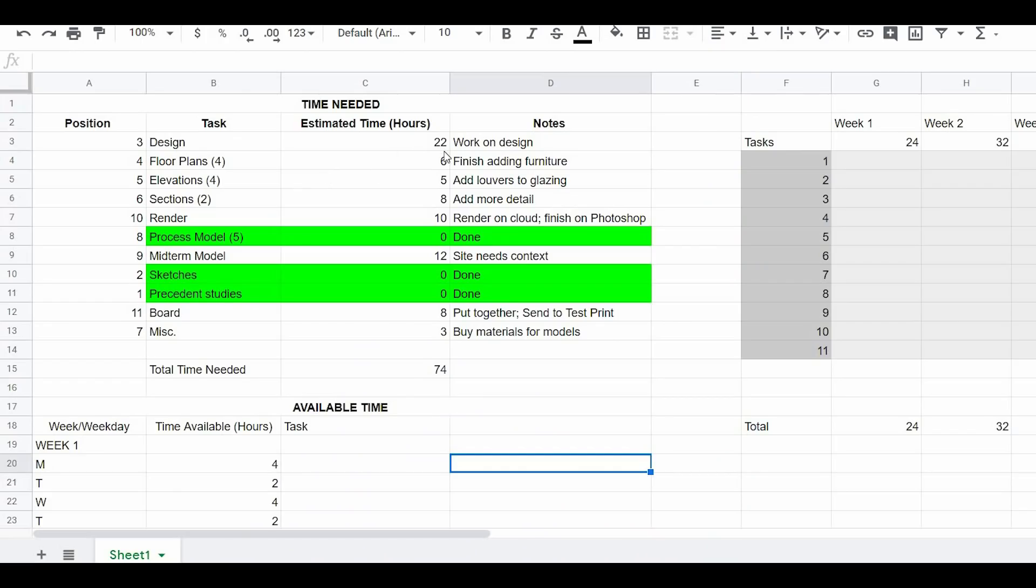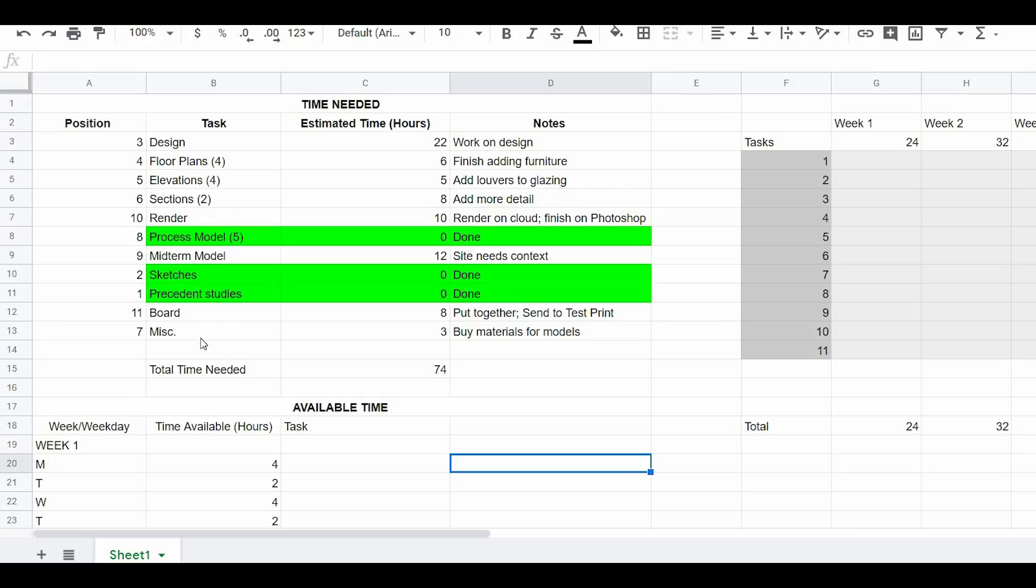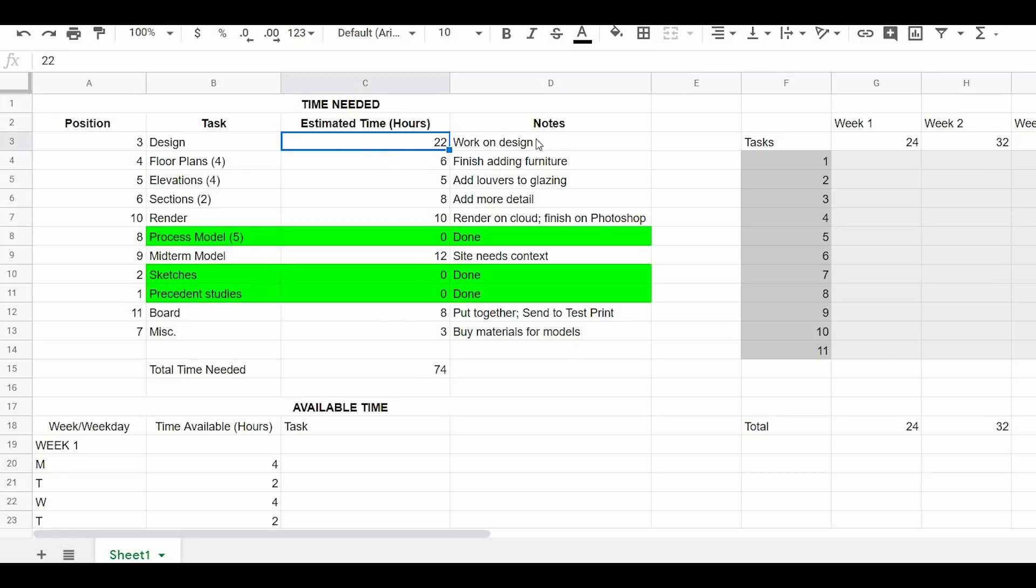Keep in mind that this example shows architectural school work, but you can use this for practically anything. So here we are on that Excel sheet that I made for you guys and it might look a little bit complicated. But I'm going to explain it to you. If this is way too much for you, then feel free to adapt this and use it in your sketchbook in a similar way that's more comfortable for yourself. But the first thing you want to do is under task, you want to write everything you have to do. So I mentioned that we need some floor plans, some elevations, sections, so on and so forth. We're also going to need to finish designing and we're also going to need to put the board together.